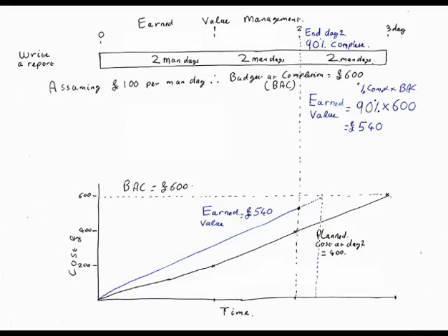How much ahead of schedule? I should have done £400 worth of work by now. I've actually achieved £540 worth of work, so I am £140 worth ahead. So I've got a schedule variance of 140 ahead. We'll do the ratios later, shall we? Yeah, we'll come to those later.